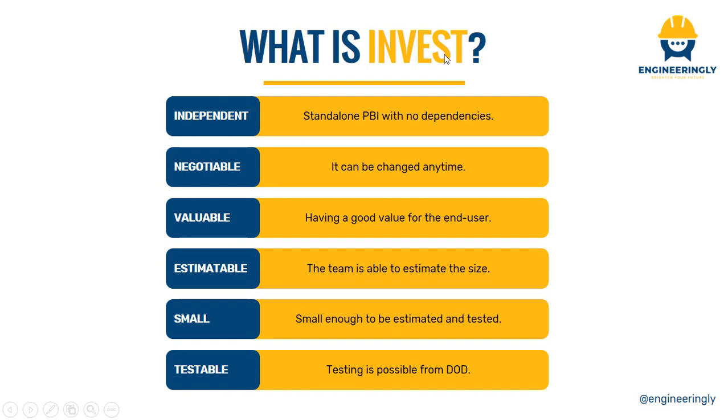And the S in INVEST stands for small. It should be small enough to be estimated and tested. And lastly, it should be testable. So as we have the definition of done, we can test it against the criteria which is listed in the DOD or definition of done.